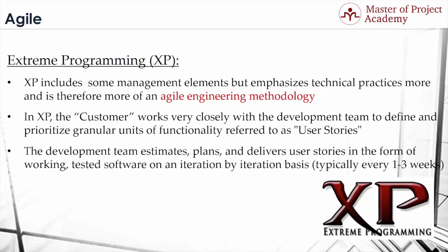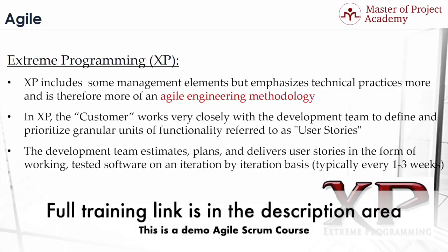First, unfinished features are evaluated, and the most important features are selected for the next delivery. Project team aims to deliver a working software at a constant velocity and comes together each day to review status and risks. Customer is available whenever needed, and this increases the collaboration and reduces the ambiguity regarding requirements.